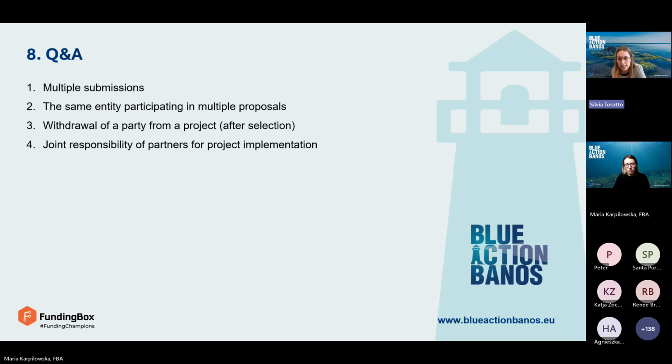Elvira also asks, if my university only asks for 20% overhead, do we take 20% overhead or should we always charge 25% overhead? It should always be 25%, because this is the flat rate used, and also in our full proposal form, this 25% is calculated automatically from the other costs you will enter in the form.